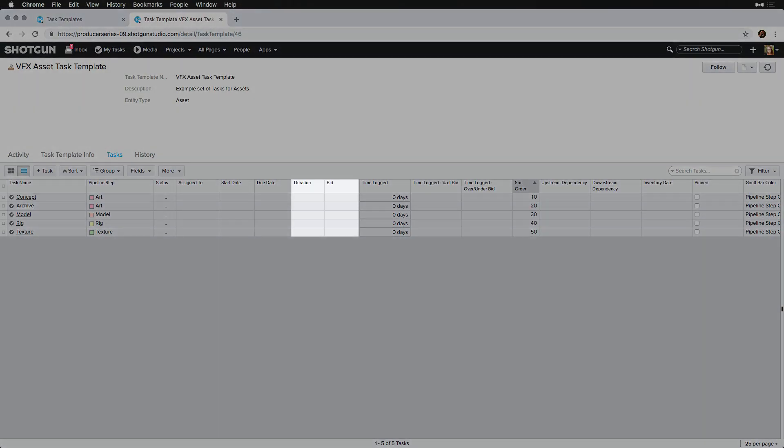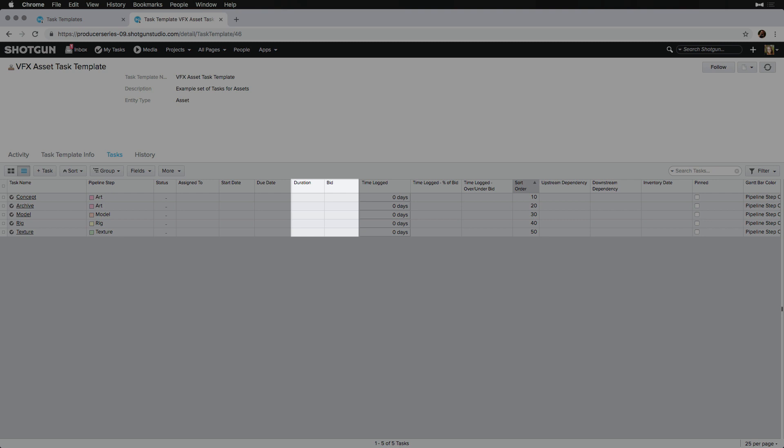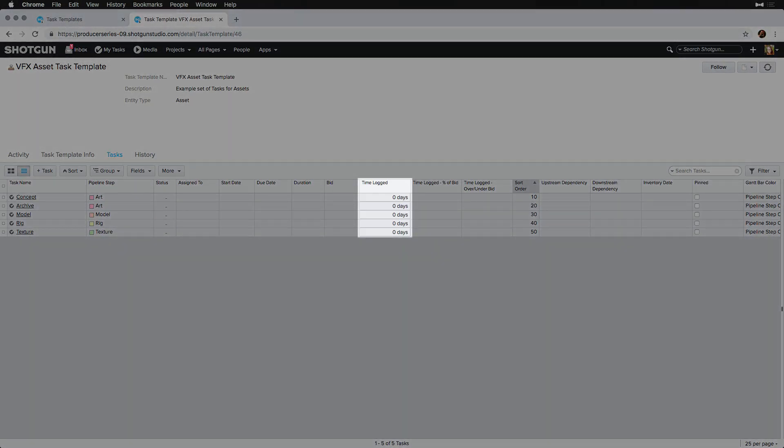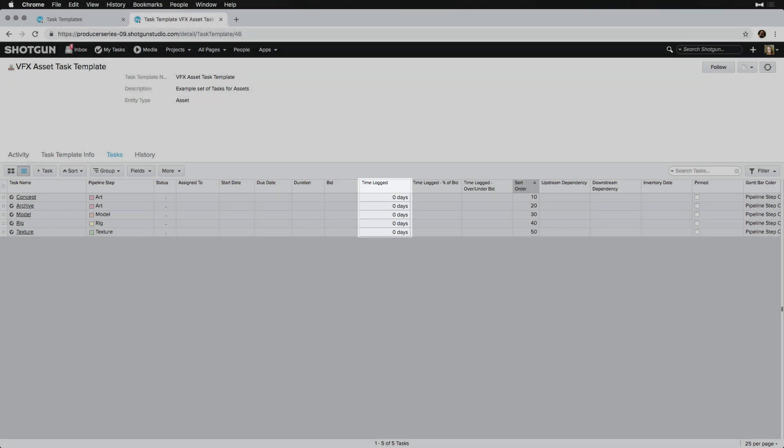The duration and bid fields are similar. The duration is the length of the task which can change over time, while the bid typically remains the same. If we were to add a default bid and duration to the tasks in our task template, we can do this so that all of the tasks already have this information when we apply them to assets.